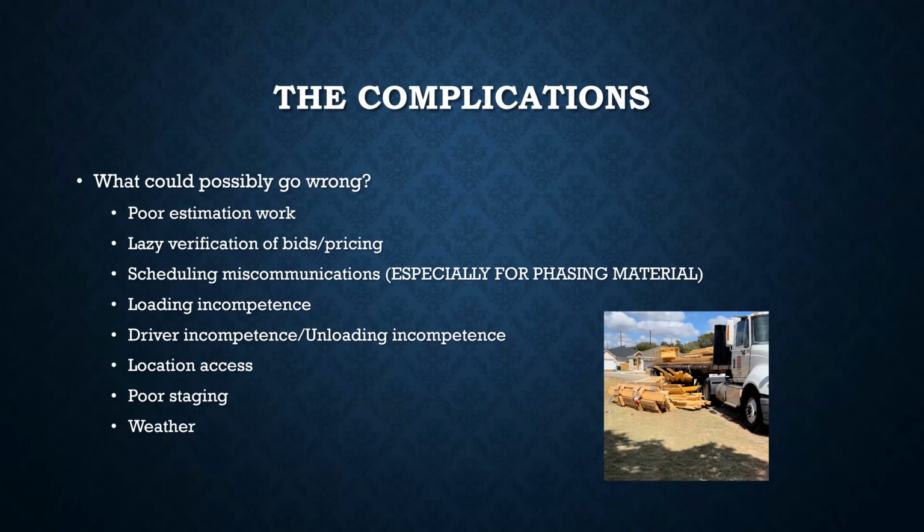Poor staging can be a problem. The basic premise is that while you have the forklift at your disposal, it ought to be used to move things where you want them to be, where they're going to be picked up, cut, and put on the house. If they stage stuff in the wrong spot, either because you're not there or you didn't communicate or whatever it may be, then you have to move it again. And you're most likely not going to have a forklift unless you happen to rent one or something. So that should be kept in mind.